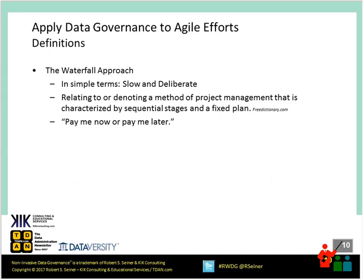Most people compare agile efforts to the waterfall approach, another project management methodology characterized by sequential stages and a fixed plan — like water pouring downstream, never going back upstream. People think of waterfall as being slow and deliberate, with the phrase 'pay me now or pay me later' — meaning you define all requirements up front before you start to design and deliver. In waterfall, organizations spend a lot of time on requirements and design before even getting into coding, to make sure they understand what needs to be integrated.